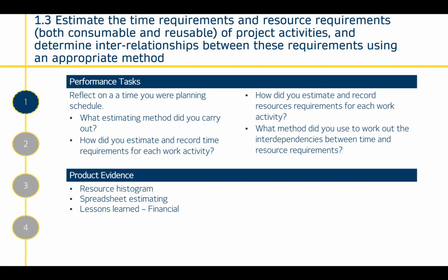The other thing to be said is that estimate methods will change over time, and over time estimating becomes more accurate. So it might be you use different estimating techniques depending on the stage in the project life cycle that you're at. So early on, you're not going to get into a lot of detail because you might not go ahead with this project, but later on, it's very important to get that accuracy in the planning.